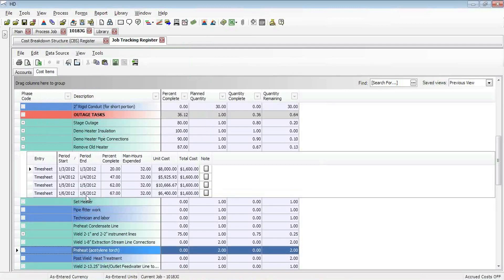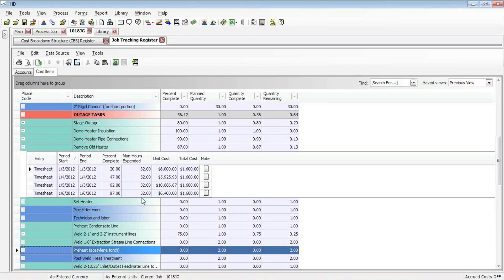And we are now, based on the quantity that was done, we're now at 87% complete. I obviously have man hours and costs associated with this timesheet as well, but we'll just focus on this percent complete, the progress that we've made. We now want to take that information and have it show up in the schedule as we are monitoring things in Primavera as well.